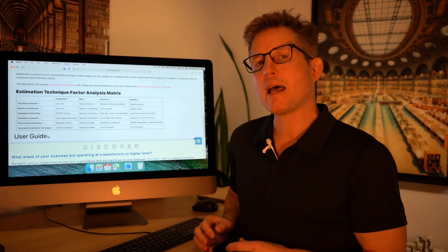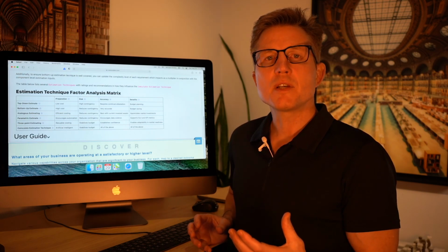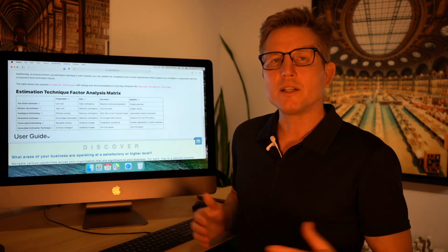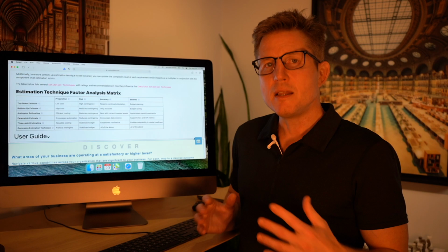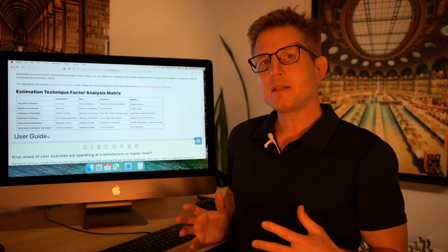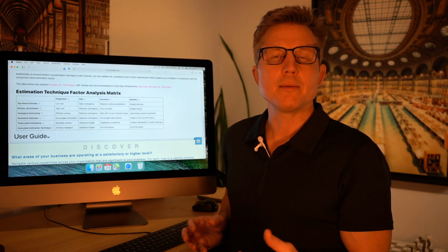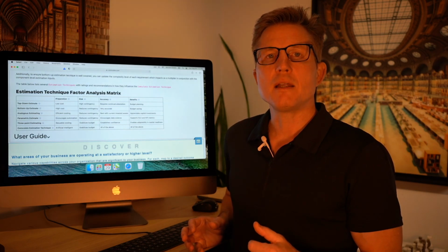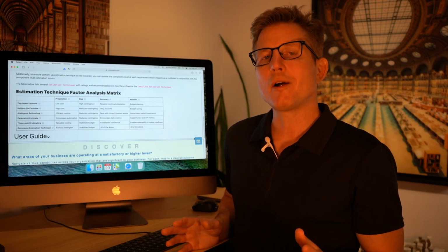So parametric, what that means is you can anchor some type of parameter that is consistent across all initiatives or all requirements. In this scenario, you have a consistent factor that you are able to use as input into the calculation, and then you just multiply that by the number of initiatives or requirements that are involved.